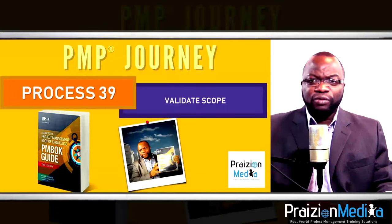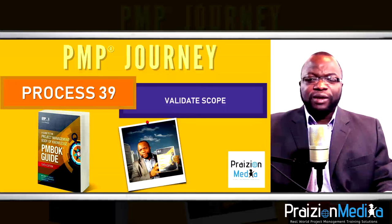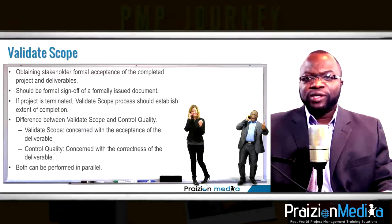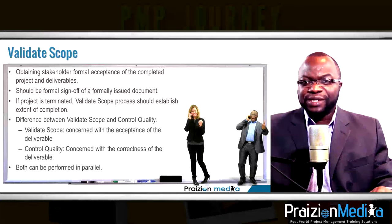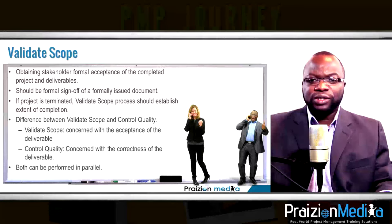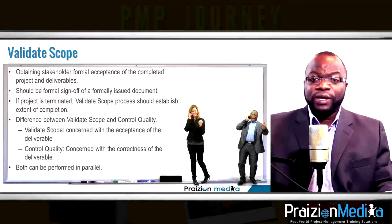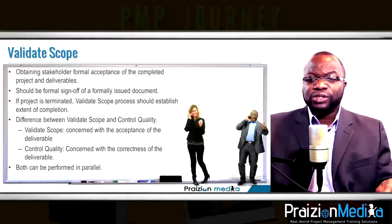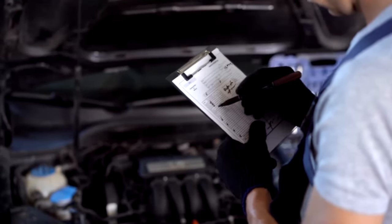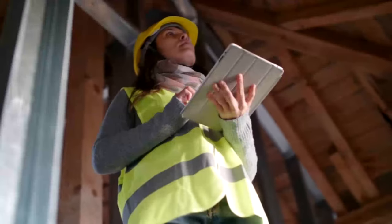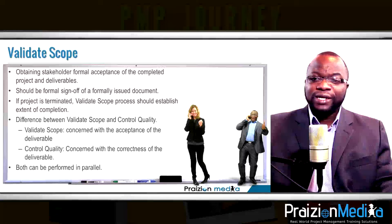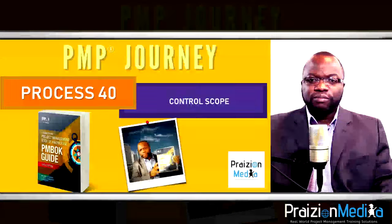Process 39: Validate scope. This is customer-focused — the customer inspects the verified deliverable that has been found fit for use by the performing organization. The performing organization first internally inspects the deliverable, and then the customer externally inspects it to validate that the entire scope, requirements, and what was needed is indeed inherent in the deliverable.